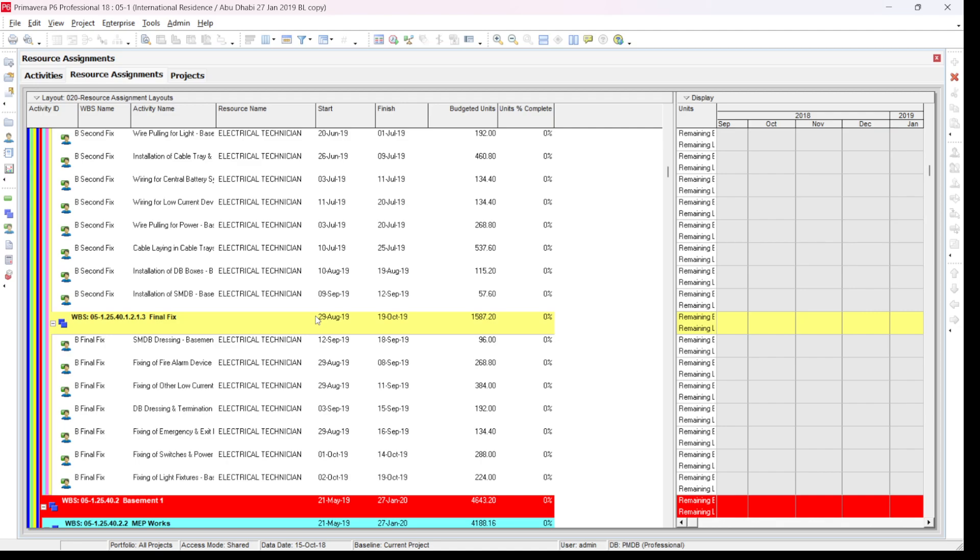So you can see that the filter is a very useful command to show or analyze a specific portion of your schedule or data. You can apply several criteria at the same time — if you want all criteria to be met, select 'All of the Following' (AND logic); if you want any one criteria to be met, select 'Any of the Following' (OR logic). You can use WBS name or WBS code to highlight specific activities, and similarly filter by resource assignment. I hope this video is useful for planning engineers and helps them in their daily work. If you like it, please like, share, and subscribe to this channel. Thank you very much, see you again, take care and bye bye.